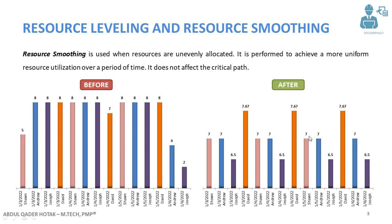The main goal of resource smoothing is to ensure that one resource does not work a lot one day and then be idle the next day. In order to overcome that and ensure that the resources are evenly allocated throughout the project, we perform resource smoothing.